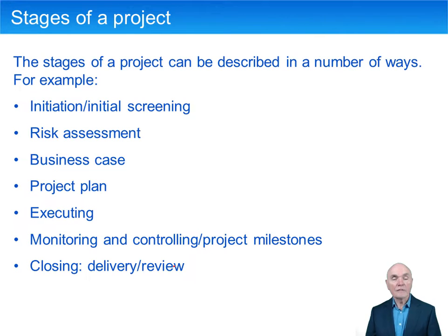First of all, and this is often left out, there's usually a project screening stage, which is where you look at a proposal and you immediately say, for some of these, we're just not going there. It is so obviously not sensible at this stage. We're not going to actually spend any more time or money or effort on it. Assuming we get through this stage, and quite often that's a kind of preliminary to the actual project starting itself, this is getting through that first little test.